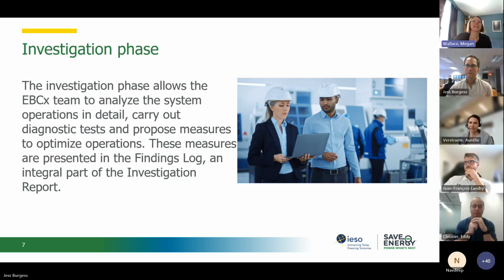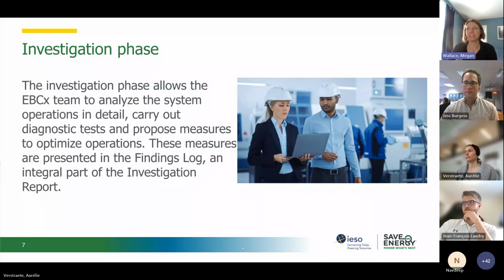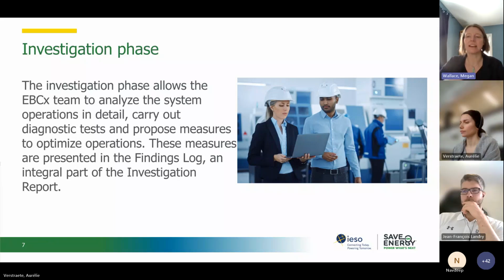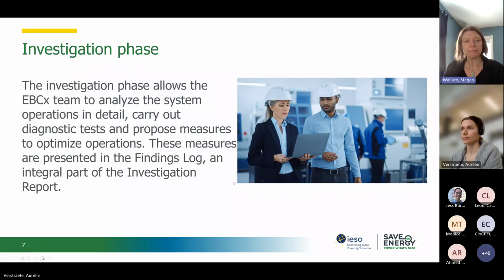Great, thanks, Jess. As we were discussing in part 1 of the investigation phase, the investigation phase allows the EBCx team to analyze the system operations in detail. They carry out the diagnostic tests, propose the measures required to optimize the operations, and then record this in a findings log, which forms part of the investigation report.